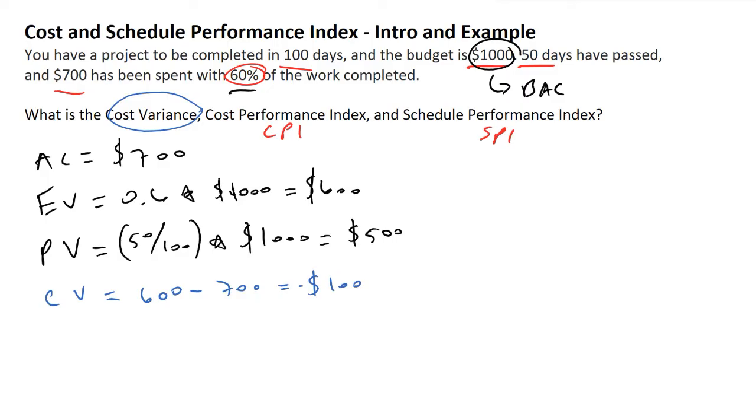The next term we're going to be looking at is called our cost performance index, or CPI. CPI is equal to the earned value divided by the actual cost. So we're going to have EV divided by AC, and this is equal to 600 divided by 700, and this is equal to 86%.